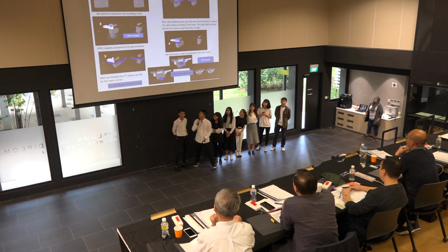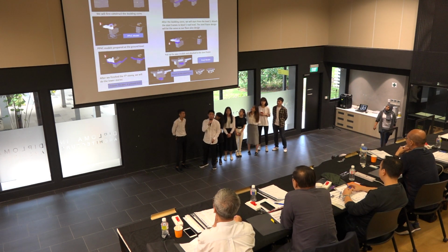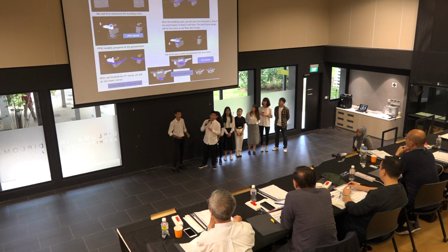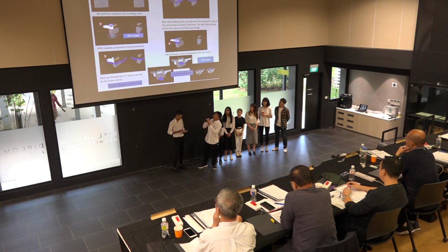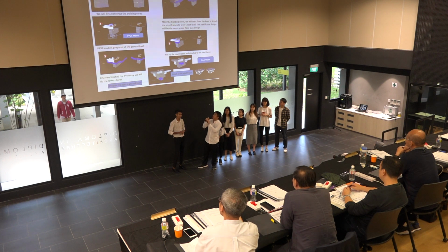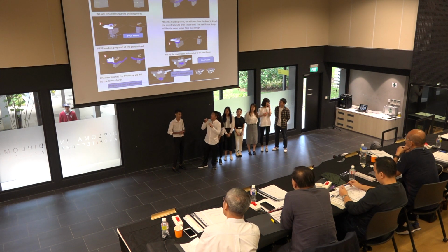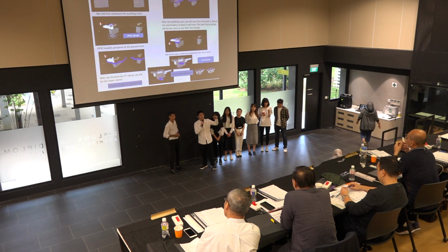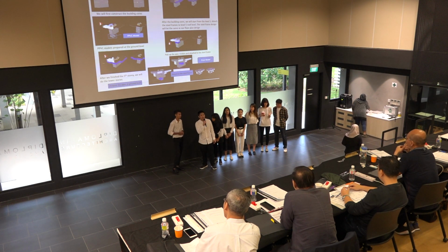We will construct from the 5-story flat first. The core is precast. We will concrete the core of the 2 buildings first. Then in the 5-story, we put the steel frame. Then we prepare the PVC module at the ground level, and we put it up and attach it to the steel frame.